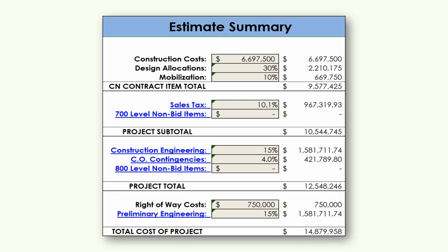The Summary tab provides your overall project cost estimate. It is very important to update this at least at every stage of your design and document everything. How much escalation do you need to add to your estimate to reflect year of expenditure dollars? To figure this out, you need to have an idea of when these dollars will be spent, so you need an outline of your spend plan.